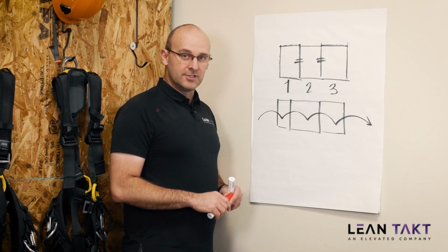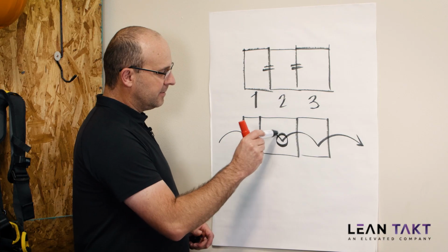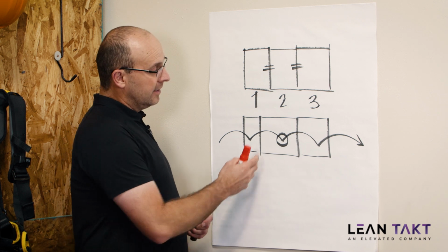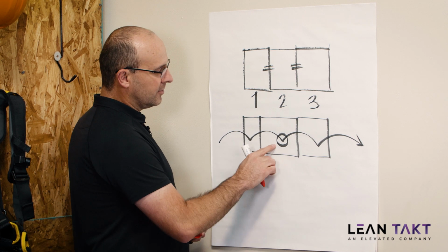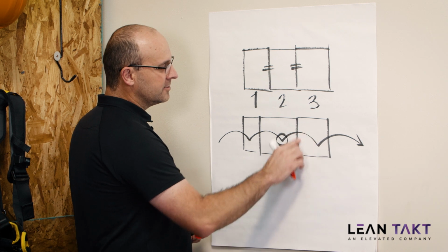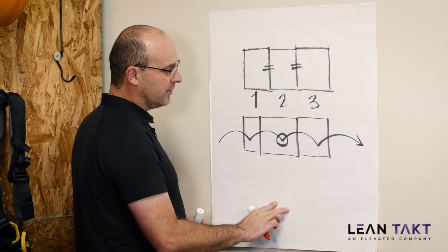If they don't, and let's say that every trade that comes through your zones is experiencing a problem in this zone, then maybe the density is not balanced, right? Maybe this one is correct, but this is a little bit too dense, so this is your bottleneck.